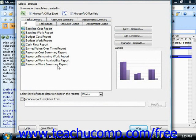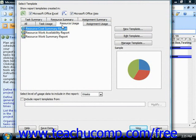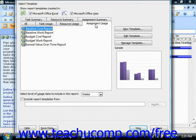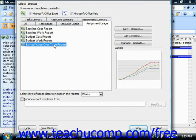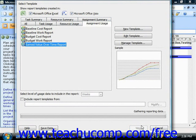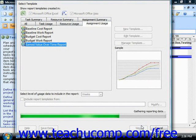You must also have Microsoft Excel 2003 or later installed on your computer. There are many types of reports available within Project 2007. To open the Earned Value Over Time report, click the Assignment Usage tab and then click the Earned Value Over Time report name shown within that tab. Typically you'll select weeks from the level of usage data to include. At this point, click the View button in the Visual Reports dialog box to open Microsoft Excel and display the resultant chart and pivot table for the report.